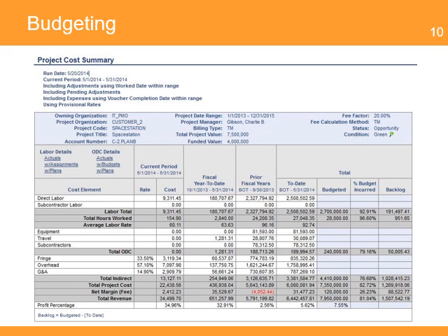The project manager needs to know the budget constraints for each major delivery and monitor the performance of all expenditures to ensure the project does not have a cost overrun. Another feature in most PMIS is the capability to add a cost to each resource used in the project and run what-if analysis to determine the impact of changes in the project.